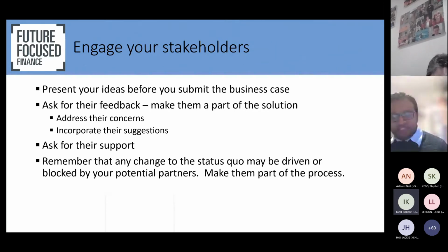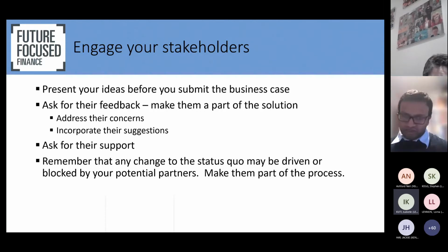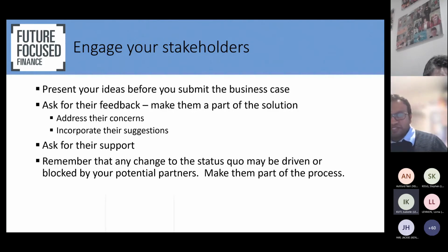The other thing to do is, if you have a small business case, make it part of a bigger business case. If you want to get some equipment and you're building a new thing, you may be able to get that equipment as part of a bigger business case. We got a lot of transport ventilators and a few new anaesthetic machines when we built our new A&E, because we put that business case as part of the bigger one. A few £1,000s here and there is nothing compared with building a £50 million new A&E. So incorporate it into other things.